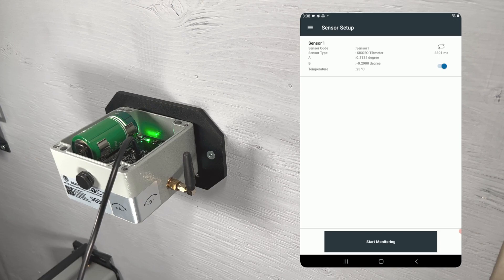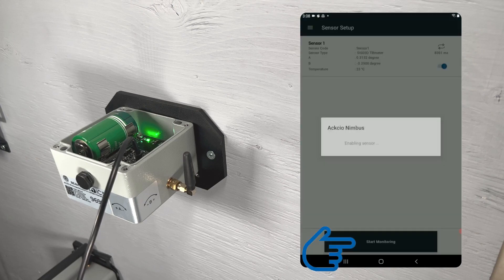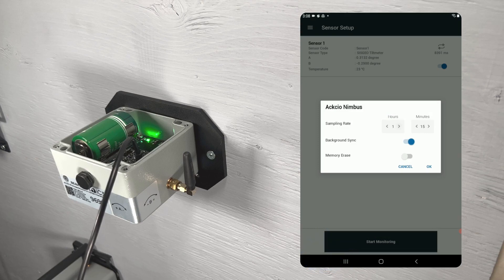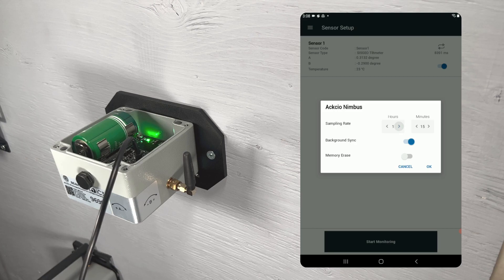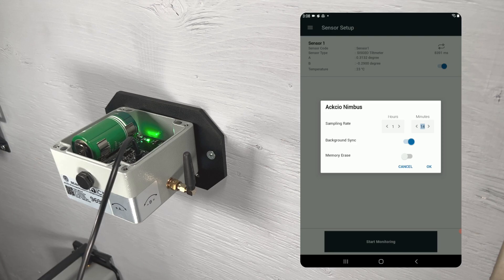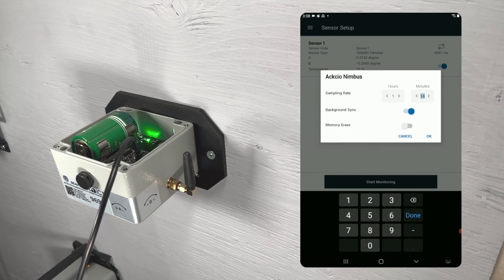When you are ready, tap start monitoring to finish commissioning your node. You'll be prompted to choose your sample rate. Anywhere from 5 minutes to 24 hours can be selected. You can also choose to enable background sync, a feature which allows your node to store data in the event of a network disconnection, then automatically sync that data back to the gateway once the network connection is restored.